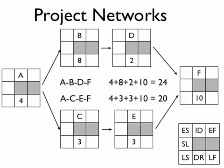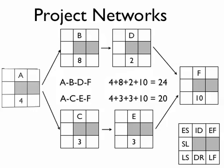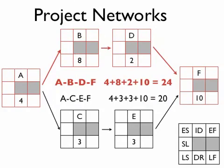Looking at our project network, we have two paths: A-B-D-F and A-C-E-F. Adding up the durations, the critical path is A-B-D-F, which adds up to 24 days. That means 24 days is the entire length of our project. We've now been able to determine the critical path. We'll stop here, and in the next video we'll look at how we derive the other time-related task properties.